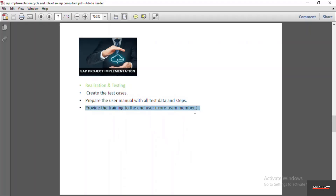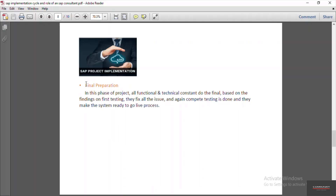Then comes the final preparation phase. If during the testing phase the core team members or functional consultants find any errors, all those errors are fixed in the final preparation. They make all objects ready for the go-live process, and after doing the required small modifications, they again do a complete testing of the final cycle and make the system ready for go-live.